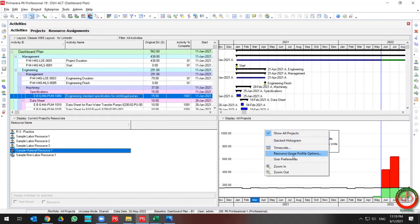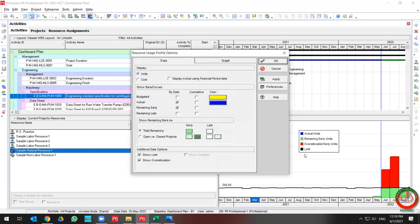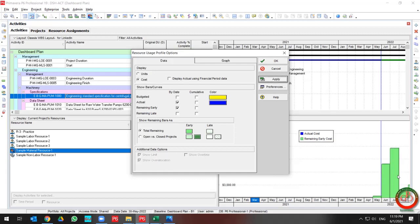If you go to the Resource Usage Profile options, this dialog box appears. You have the opportunity to toggle on Cost, and if you click Apply, all the curves change to display cost.